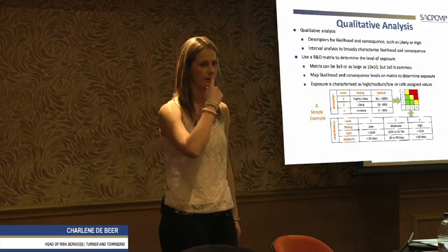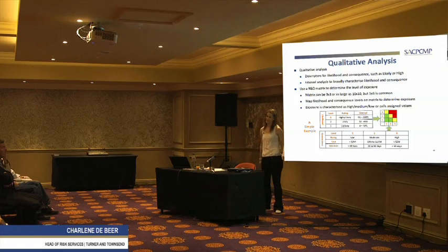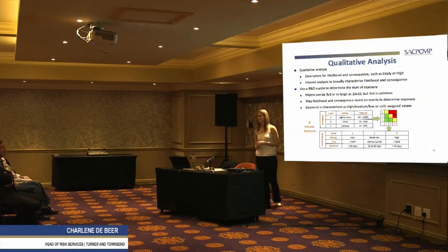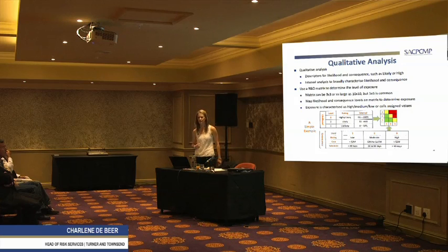And then the guys start thinking, and they go, well, if I say 75, I'm kind of saying we're in trouble. If I say 35, I'm actually not really flagging it, because it is quite a concern. So sometimes they'll peg it at 75 and say, look, we don't think it's quite that high, but 35 is too low, so we need to make sure we do X, Y, and Z so it doesn't happen. So very important is, what do you base your likelihood and consequence table on? How is it established? What's the percentage assigned to it, etc.? Because that is what we're going to use to do a quantitative risk analysis.